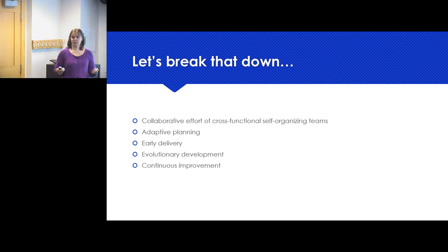And continuous improvement is a huge part of what we do, and that's across everything, not just our code, but also our process. So every week when we finish an iteration, we get together and talk about what went well and what didn't go well. And we try to figure out what we can change to make things go better. Sometimes that's, hey, we're having a lot of bugs. What's going on? Oh, well, this piece of the code is really tricky. So, okay, let's take some time and look at that piece of code and see if we can figure out a different way to do that.